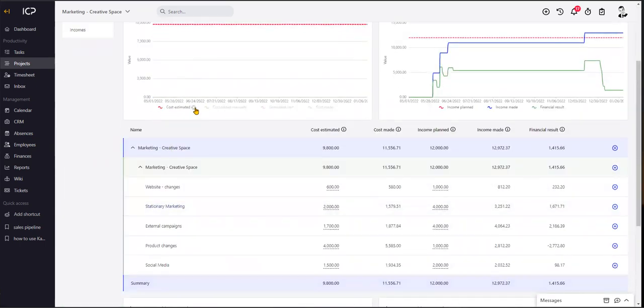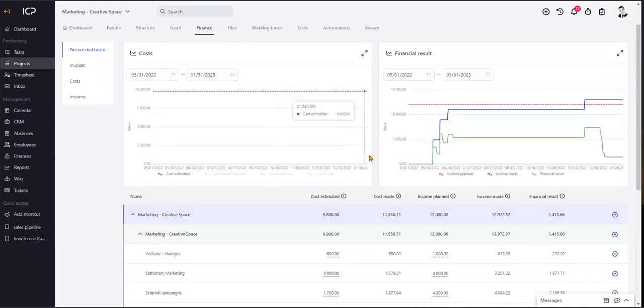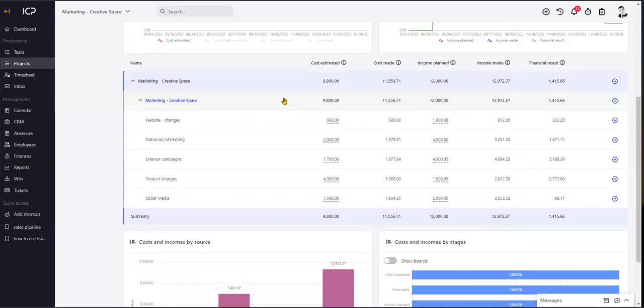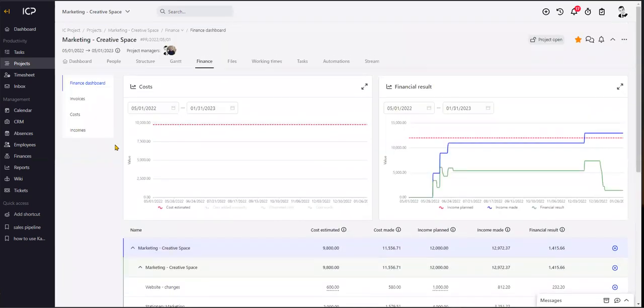Estimated cost, because the system gives you an opportunity to estimate cost starting from the bottom, and then we sum the estimated cost from bottom to top. So my estimated costs for this project are around 10,000, as you can see from this chart. Whenever you want to estimate a particular cost for this building block, for this Kanban board, just add the numbers here and they will sum up to the entire project. So this is how you estimate costs on your project.